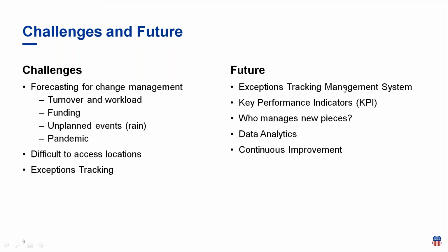And then exceptions tracking. We wanted to roll out an enterprise system for exceptions tracking, and we had a little bit of a hiccup there, and we are looking into the future to get that up and running. So right now we're using an interim solution with spreadsheets on a shared drive and working directly with those project managers in each state.